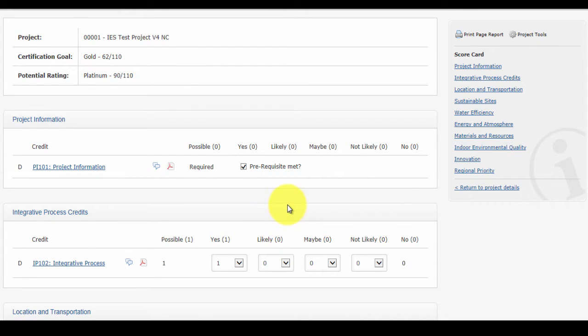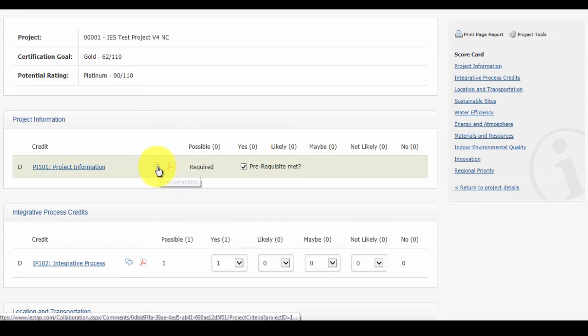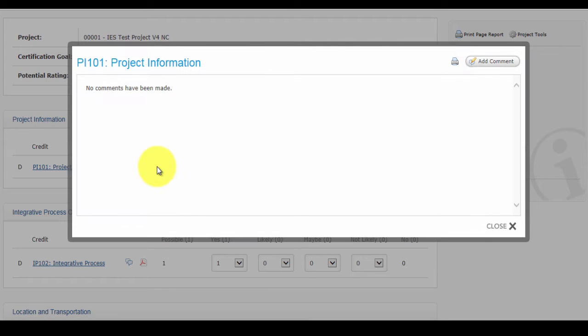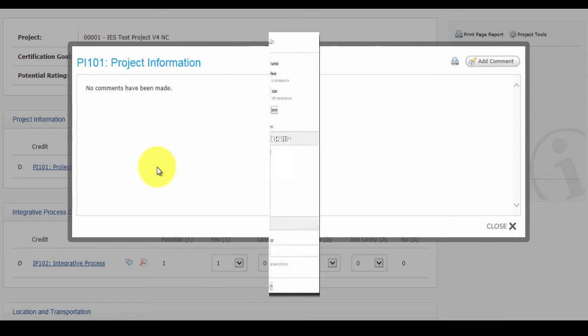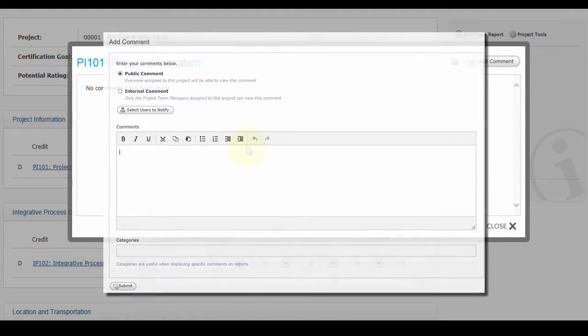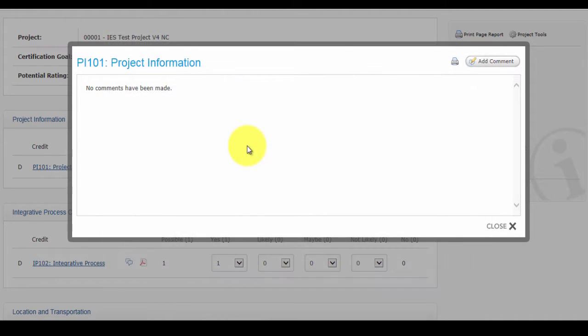maybe, likely, not likely, in order to generate a certification goal and potential score. You can also make notes on the scorecard. The LEED administrator can use this to publicly issue comments that everyone on the project will see or some internal notes that will be visible just to the project team managers.